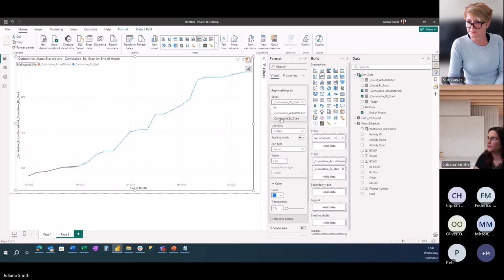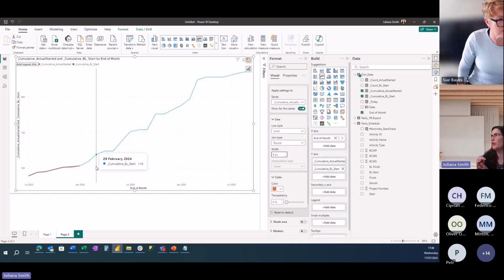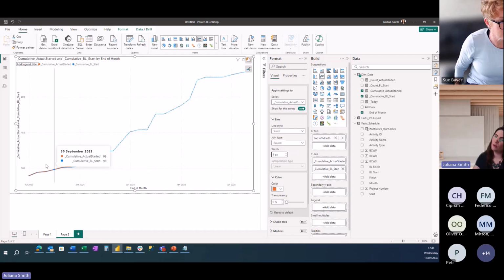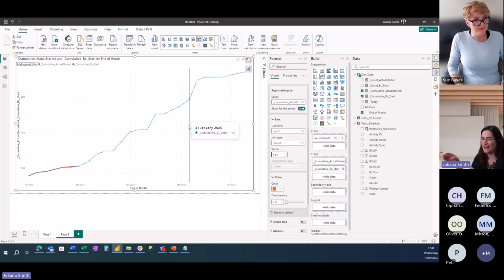Yeah. So you can see it doesn't look like an S-curve because the data is not real, but that's the idea. So you can see how much has been done. If you are behind, the actual curve will be under the plan, and you can see how much it is. What I've done in a project before was also adding 3 months to the date, to kind of know where we're going to be if there is this kind of delay. So we'll have another curve here with plus 90 days.